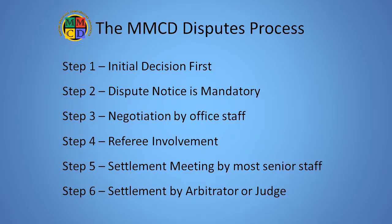Here are the steps involved. Number 1. Get the initial decision from the contract administrator. Nothing happens without this.